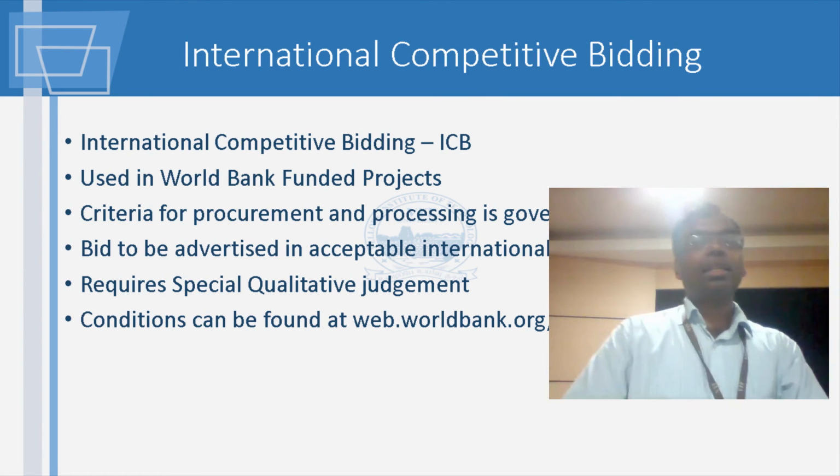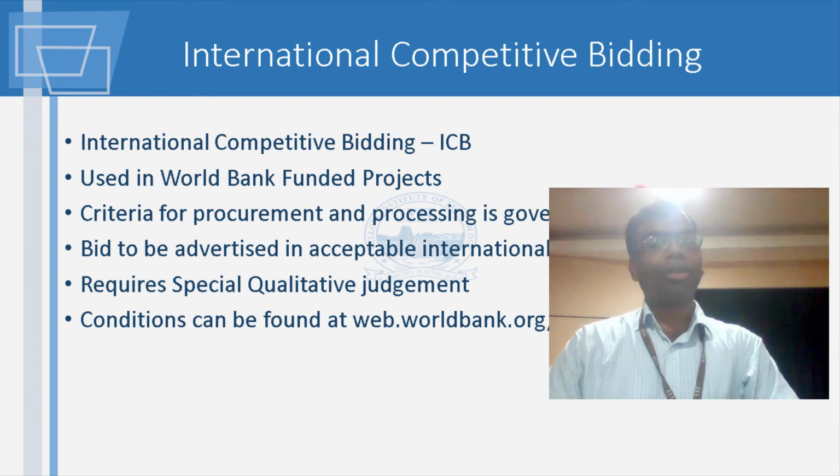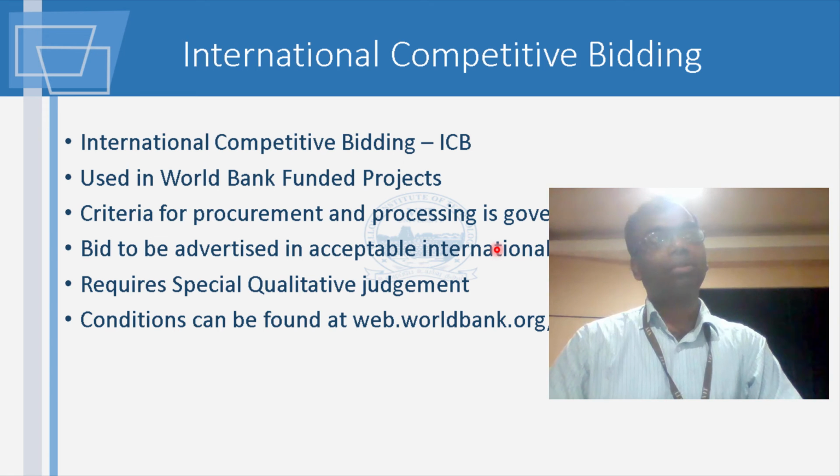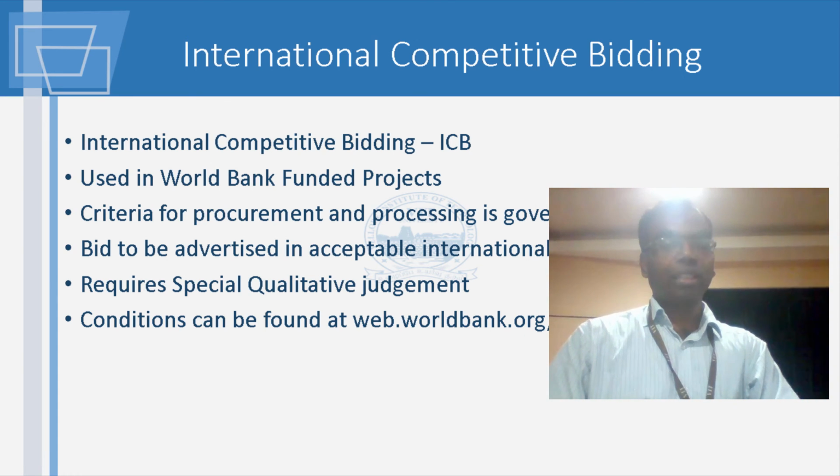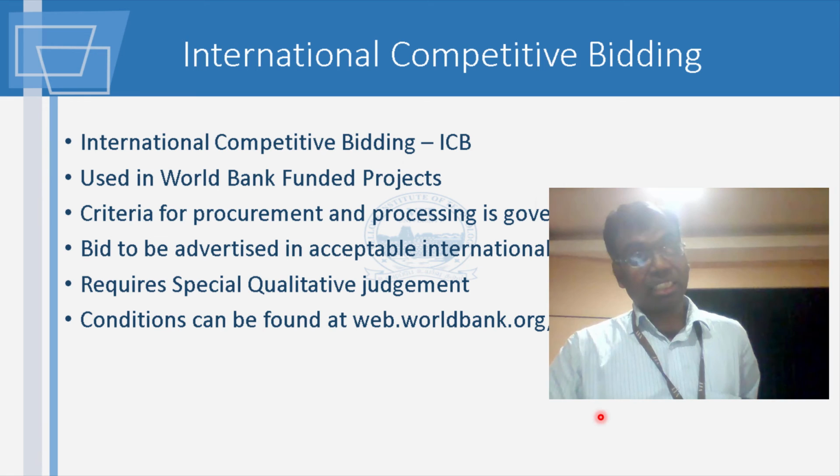So if you're going to take some World Bank aided projects, you have to go for this format. They call it international competitive bidding, where all the criteria are predefined. Typically the language is English.